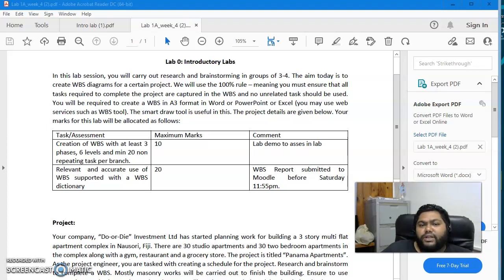First of all, in a group, we must gather the critical project documents, and then identify content containing the project deliverables, such as the project charter, the scope statement, and the project management plan. And then you have to identify the key team members. You have to identify your appropriate project team members, analyze the documents and identify the deliverables. And then you have to define the level 1 elements.